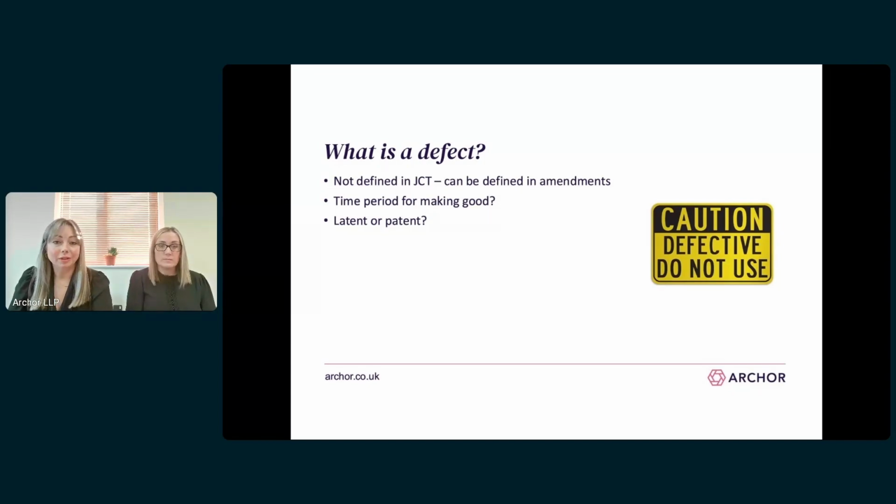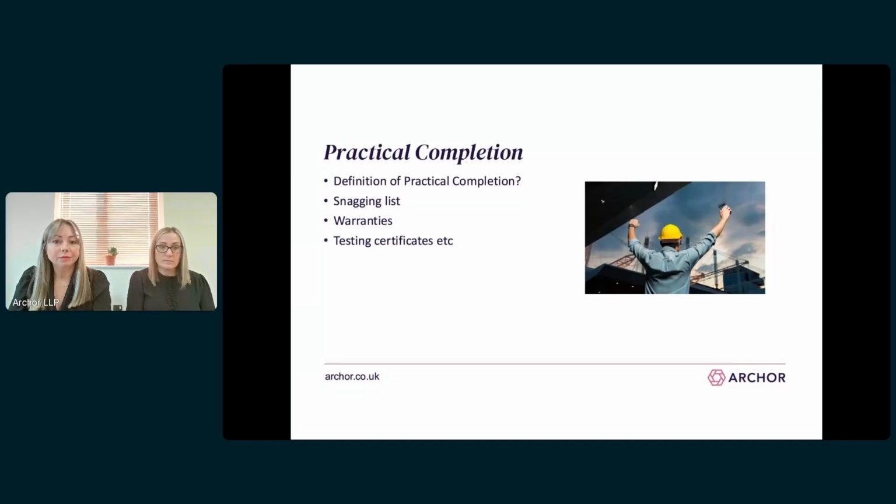But the key point of this is to know that just because a certificate of making good is issued doesn't mean the contractor is off the hook for defects that may come to light after the rectification period has expired.